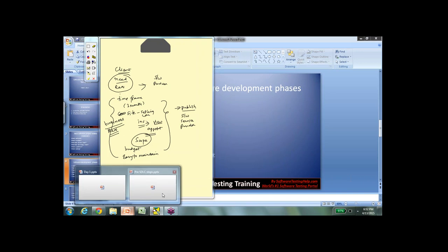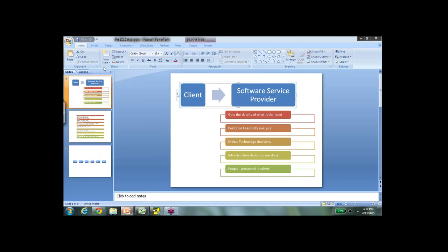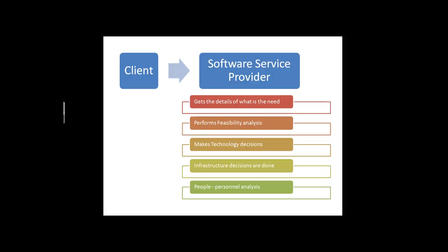Now, each service provider would get the requirements, figure out what the need is, and then perform a feasibility analysis. Feasibility analysis is a term that we will hear over and over. What it simply means is the simple question: can we do it or not? Clients may or may not be computer savvy, so sometimes they might come up with requirements that are simply not possible to implement through software. This is actually a real request.